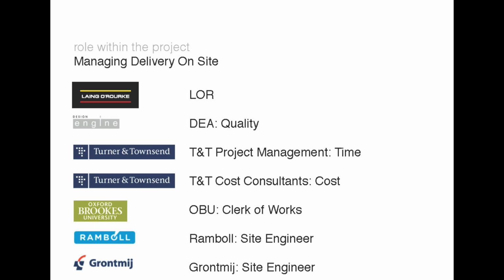There's other consultants who are appointed to manage the other aspects of the cost, time, quality triangle, which I'm sure you know about. So Tenor and Townsend project management manage the program, they manage the time, make sure it's going according to program. Tenor and Townsend cost consultants are appointed to make sure we're staying on track in terms of the budget. Oxford Brookes also have appointed a clerk of works, which they use for, I think, a lot of their projects on site to check from the university end that what's being built is in accordance with what they want.